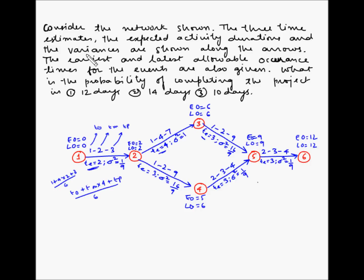We have also been given the variances, which is expressed as the square of the standard deviation. For activity 1-2 it is 1/9; for 2-3 it is 1; for 3-5 it is 16/9, and so on. The earliest and latest allowable occurrence times for the events have also been given. For event 3, the earliest occurrence time is 6 and the latest is also 6 days. For event 4, the earliest occurrence time is 5 days and the latest is 6 days.